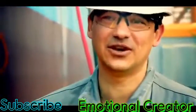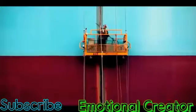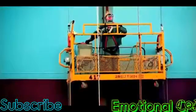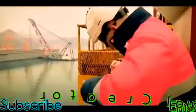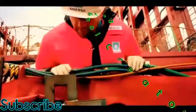They have to make up for the lost time. To weld the mega blocks together by hand would take around 20 passes. So to speed things up, the crew use an army of welding robots. It's a very fast method of welding, and that's why the yard are using it. These electro-gas welding robots need just one pass on each joint. They melt the steel seams of the mega blocks together in milliseconds, creating a watertight joint.